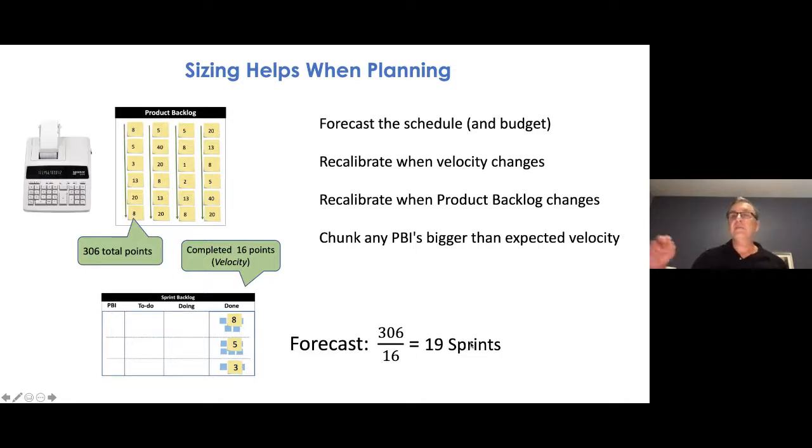Now, if in the next sprint or the sprint after that, I add a bunch of new things to the backlog, because the question was asked earlier, yes, we're going to discover places where we're missing things in our backlog, then we need to size those as well. And that's going to change the value of the numerator in this equation, which is going to extend our timeline unless we do some subtraction and move things off.